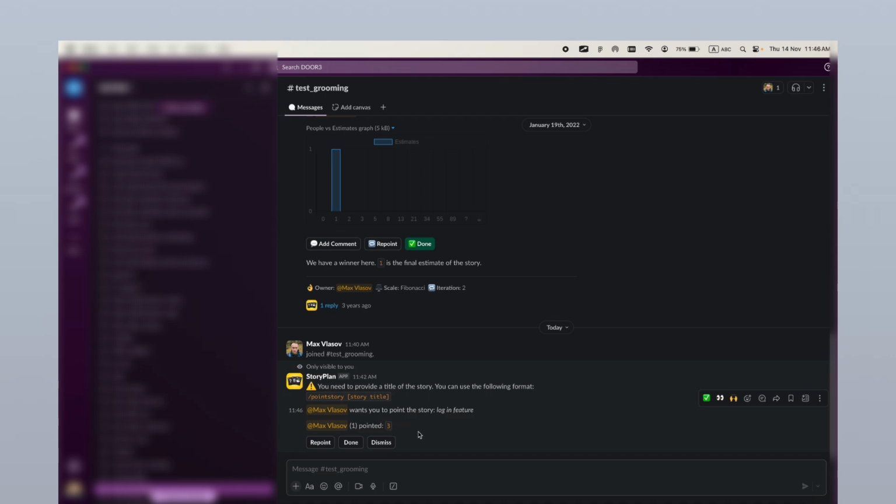There could be a typical case when, for example, one team member assigned 3 story points, another 5, someone 9, and you as a team need to communicate to reach agreement. Okay, what will be the common decision? What number would you like to assign to the ticket? And you as a project manager need to give a voice to each team member who would like to argue, for example, why they think that there should be 5 or another amount of story points.